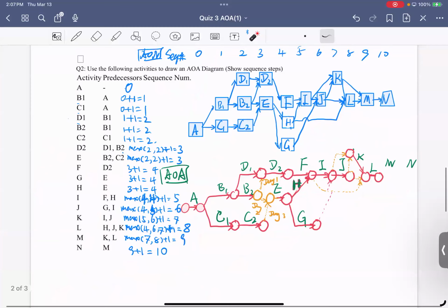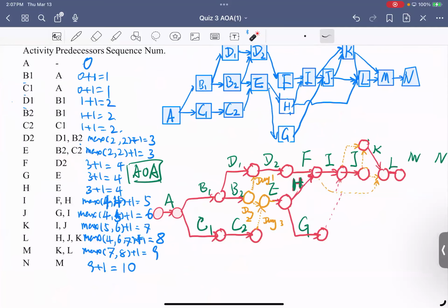So if I and J are connected, shouldn't I already be covered because of J? Yes, you're right. Because J is next after I, if you are the scheduler you can avoid that, because J is always after I. So then K is after J and I.